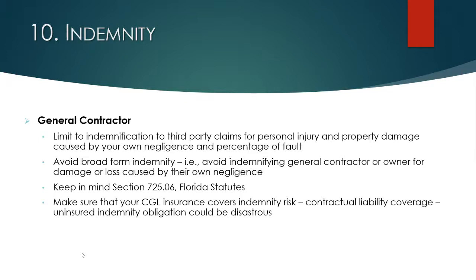If you see references to 725.06, that should be a red flag for you to try to get that out. Talk with the lawyer about how to limit that obligation in the indemnity provision.